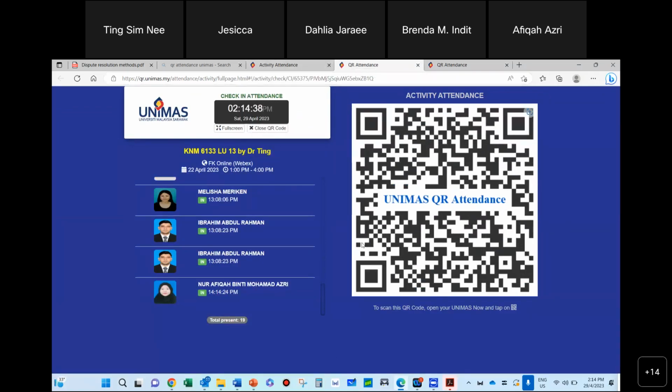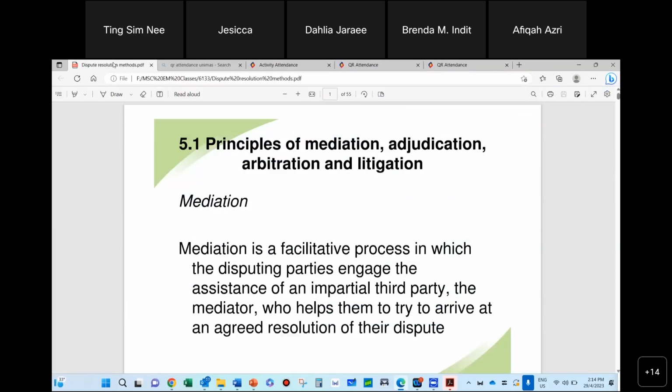All right, let's get going. All right, so as we move into dispute resolution, now that let's say you cannot solve conflicts, conflict has escalated, and then it's gone into very contractual kind of issues, what do we do next? You see, this is going to be based in the contract. Some contracts will call for mediation, some will call for adjudication, some will go for arbitration. None actually tells you to go for litigation, okay?